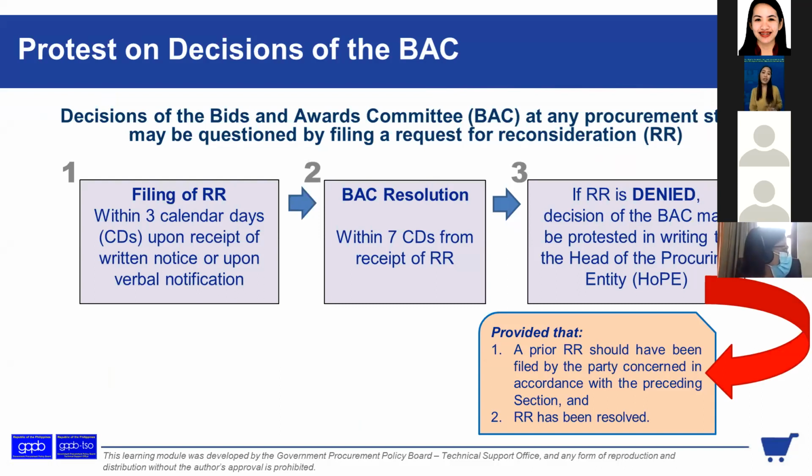Pag may mag-file sa inyo ng request for reconsideration, it's actually the observation of due process in your favor. Why? Because it is your decision or resolution that is being asked to be reconsidered. Binigyan kayo ng chance na i-reconsider yun kasi baka may lapse talaga kayo, may hindi kayo na-appreciate, may mali kayo. At least hindi kayo ididiretsong idedemanda. Diba? They have to go through the filing of RR first to give you a chance to correct yourselves.